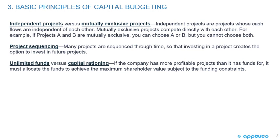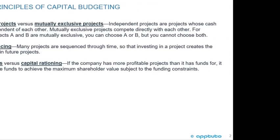Unlimited funds versus capital rationing: if the company has more profitable projects than it has funds for, it must allocate the funds to achieve the maximum shareholder value subject to the funding constraints. We'd add up all the projects within the capital budget that will give the highest NPV. And that's the last and only slide for this LOS.